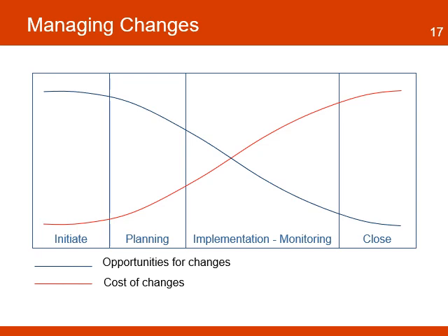The more the project manager postpones changes to the project, the higher the cost will be. This highlights the importance of establishing a good monitoring process in the project as early as possible in order to take advantage of the opportunity-cost relationship.